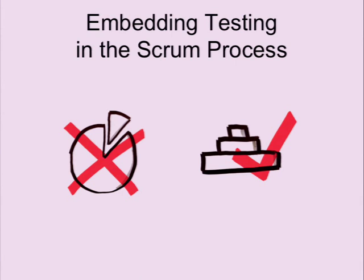If you implement Scrum, don't start by leaving out certain parts of Scrum. Just take the method like it is and really follow all the things given by the methodology from the very beginning until you really understood the Scrum process. Leaving out certain aspects from the very beginning is the main mistake when teams start implementing Scrum. But what you actually can do is put things on top of Scrum, like add additional rules, additional artifacts, whatever, and use the Scrum process just as a framework.